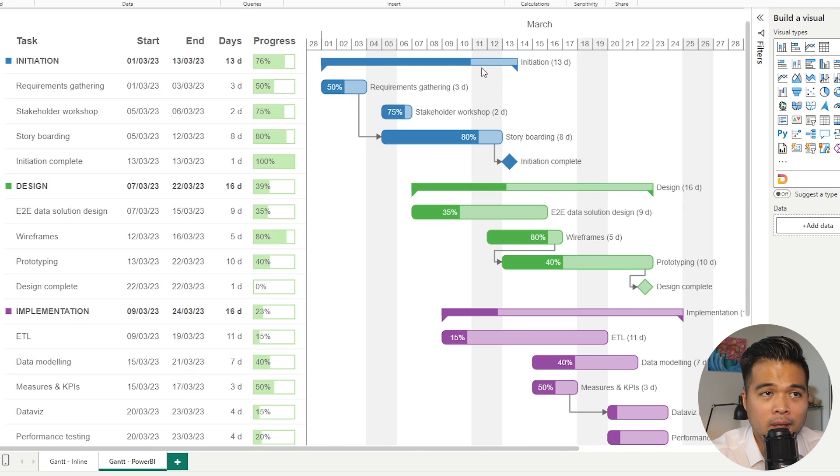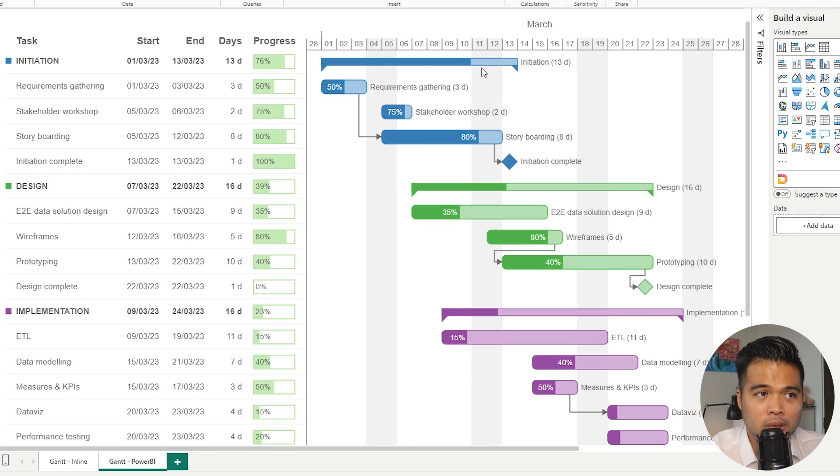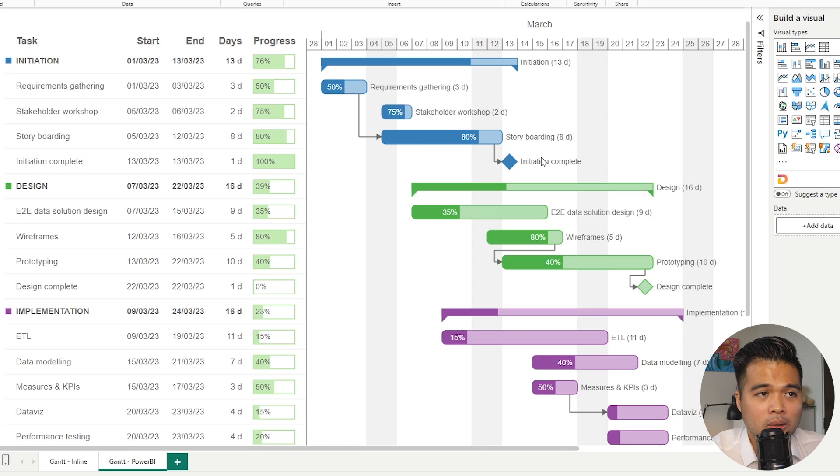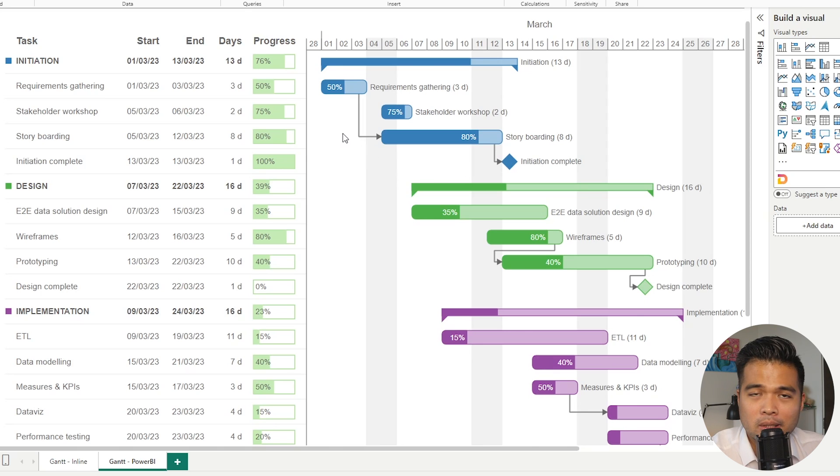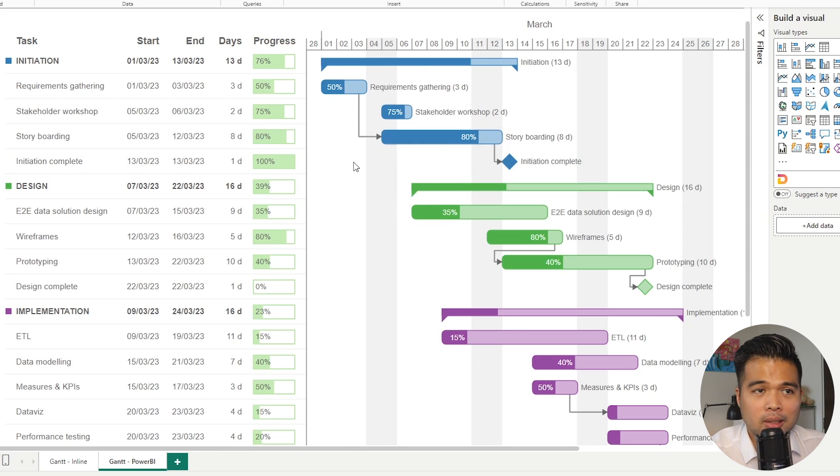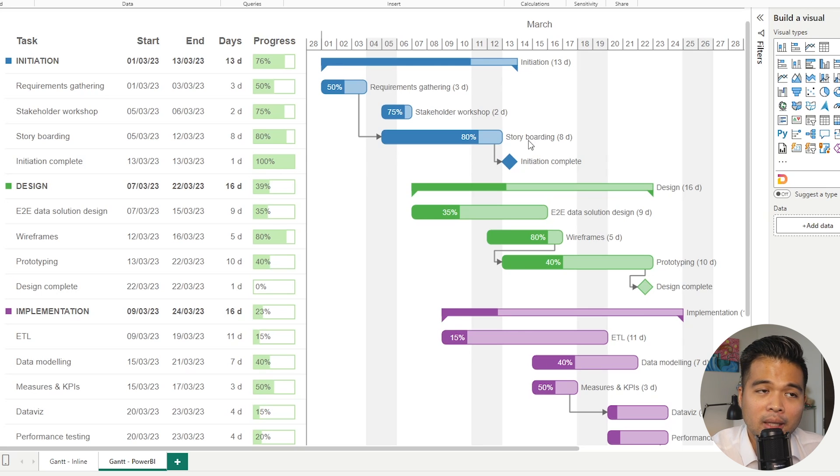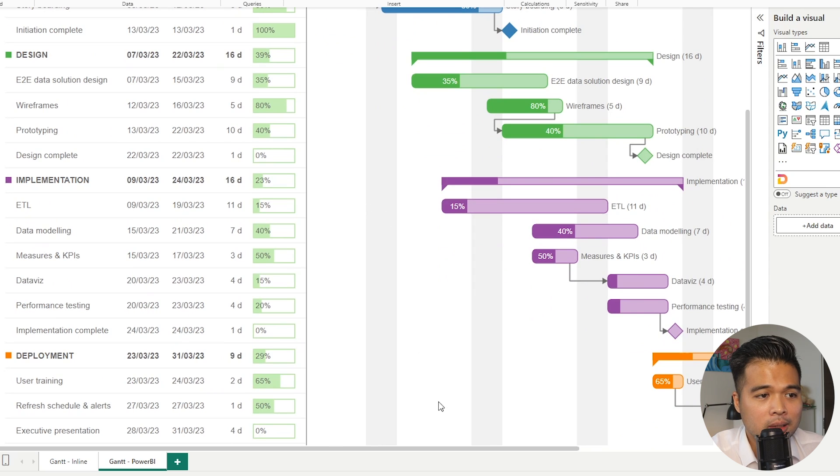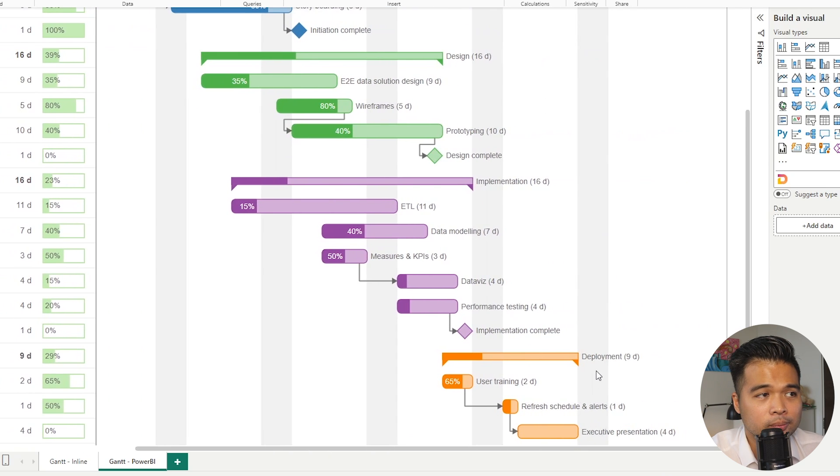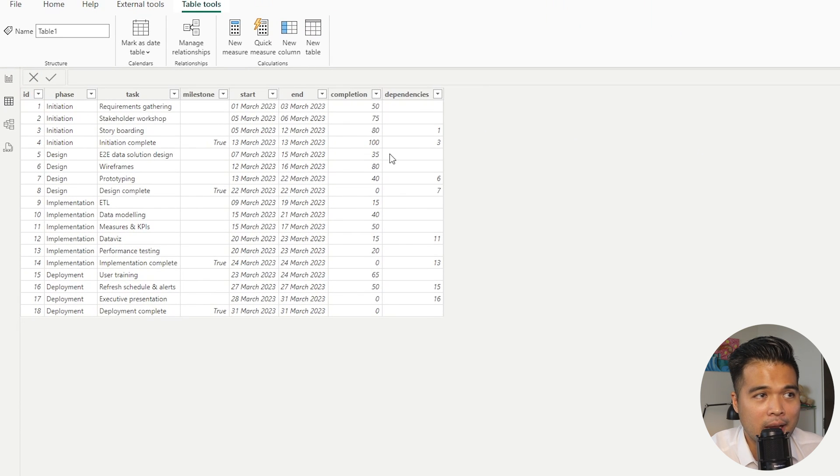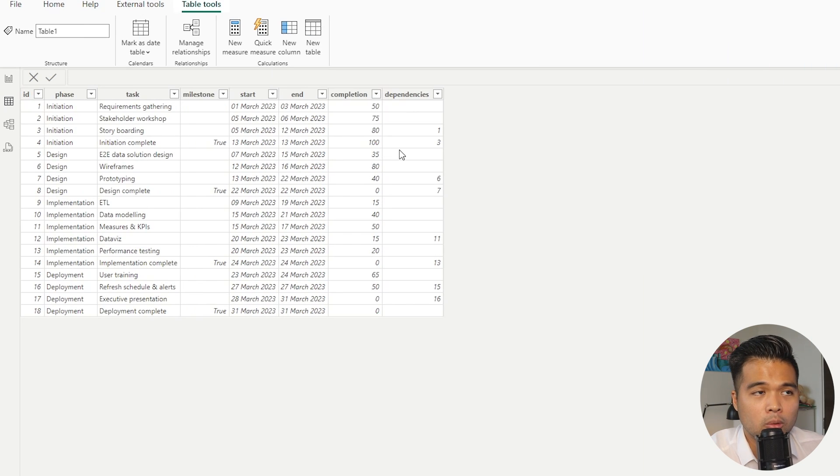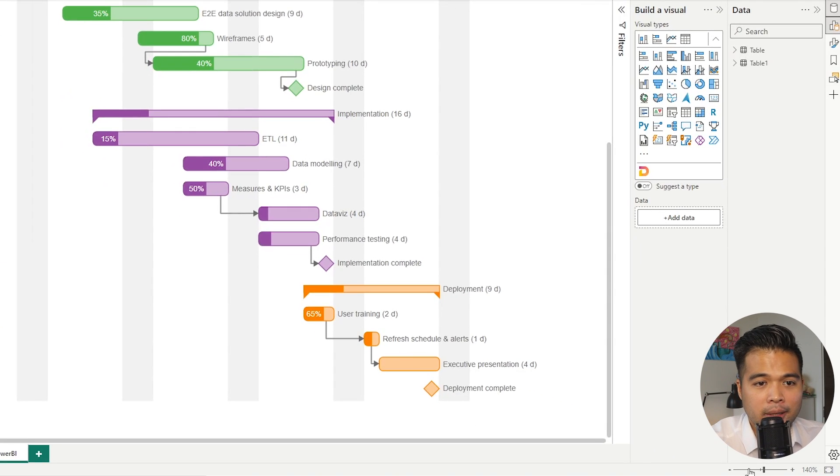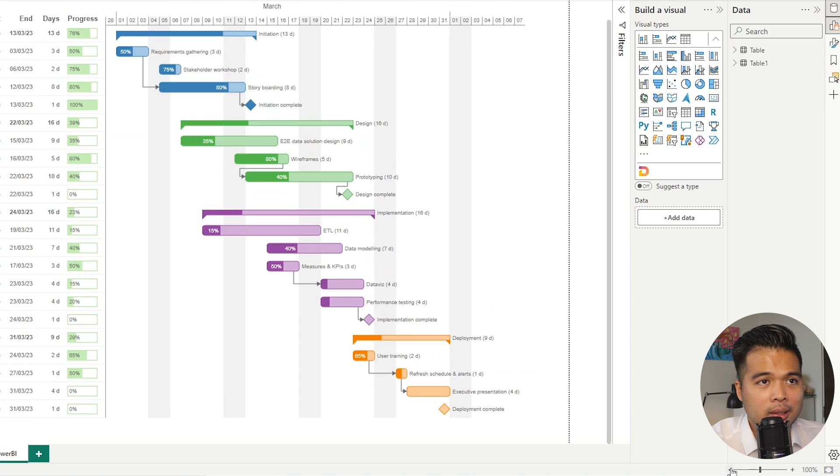This is, for example, the initiation phase, and it gives you the range of that phase from start to finish. Within that phase, there are multiple tasks for each of these requirements gatherings, stakeholder workshop. Within each of them, there is a progress bar that shows you what is the progress of that phase or that individual task, which is really handy to see if you want to measure how far you are from completion. You also find these diamonds, which are essentially just milestones, so they are just point-in-time tasks or activities that need to be hit at a certain date. And you also notice that there are some lines here, these are dependencies. So these are arrows that point from one task to another. Dependencies are basically things that are tied to each other. So you can't, for example, complete the initiation phase without finishing the storyboarding. Obviously there are a bunch of other phases here, just differently color coded. And all of these are defined using this table data that we have right here.